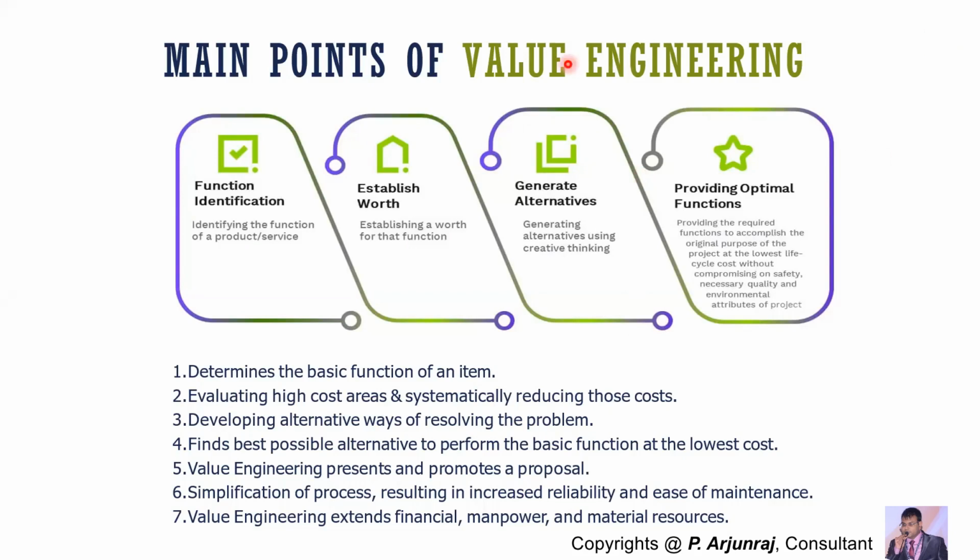So we have some important points of value engineering. The first one is going to be the function identification. I told you the function is the main criteria, as value is defined as a ratio between function by cost. So the first thing is the requirement identification, which is very much important with respect to the product or service. Next, you have to establish the worth. What is the worth you are going to give to the customer? So you have to establish the worth for that particular requirement.